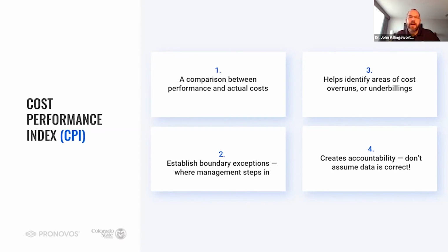Certainly helps to quickly identify cost overruns. This is a cost control exercise, not a cost reporting exercise, right? Which means we don't want to wait until after the project is complete to find out how we're doing. That doesn't allow us to make any changes as we go. And again, similar to the SPI, this creates some accountability. Again, don't assume that data is correct.